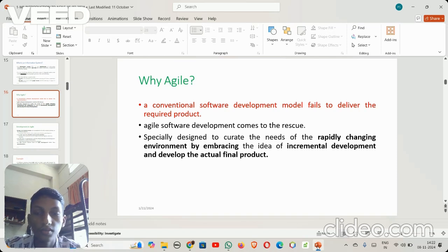The next stage is sprint planning. The sprint planning meeting is where the team decides which features from the product backlog they are going to work on during the sprint. A sprint is a set period, usually 1 week or 2 weeks, during which the development team must achieve a specific goal. The team also decides how many of each type of task they can complete during the sprint. For example, the team may decide they can complete three coding tasks, two testing tasks, and one documentation task during the sprint. This information is then added to the sprint backlog.